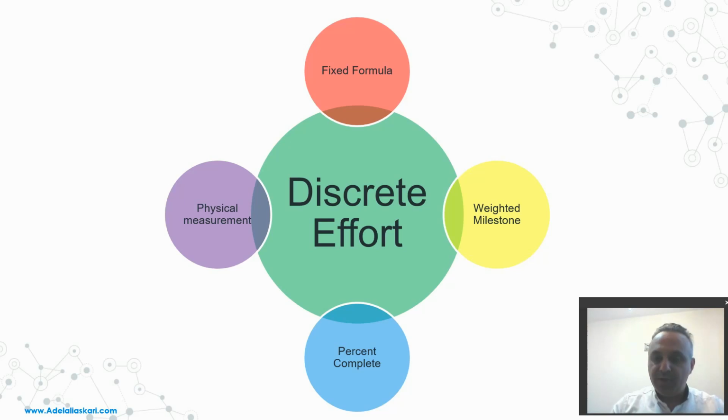For this scenario, the standard says that the work package should not exceed more than one reporting period. Only use it for a work package that takes less than one period of updating or reporting.